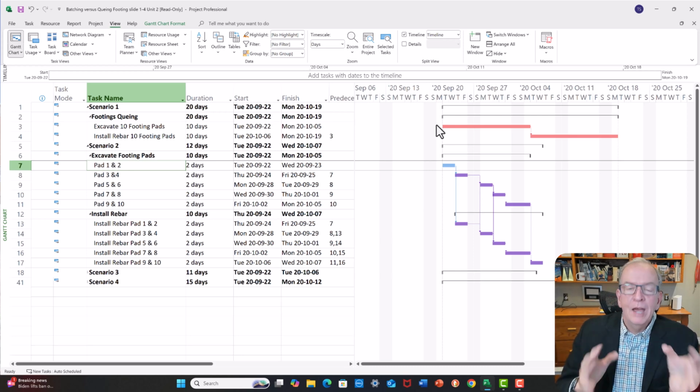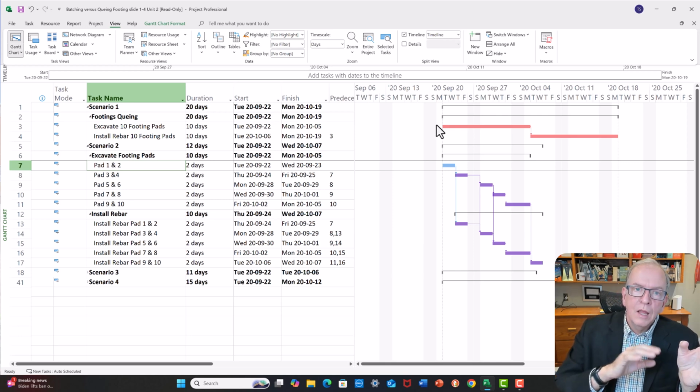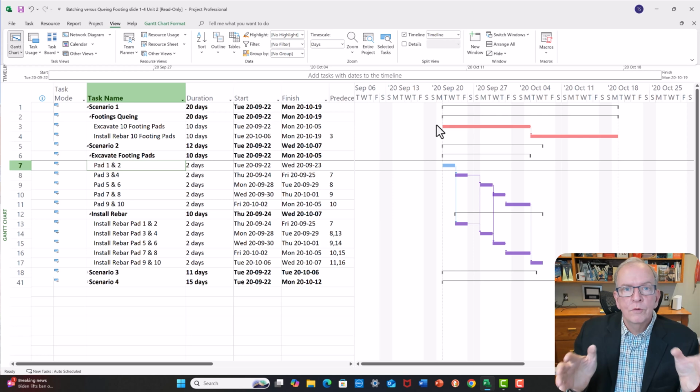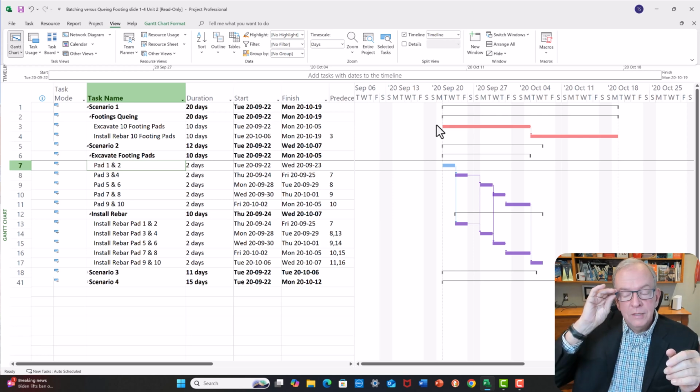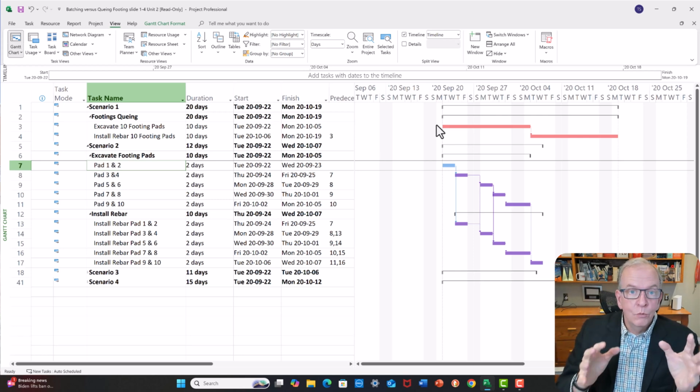But very often I'm telling you that trades will want more space than they actually need. Does this take more coordination? Yes. Is this getting closer to what we call line of balance scheduling? Is this getting closer to what we call tact planning? Yes. Is this shortening your overall duration? Yes. And this can be a very, very effective way to run your schedules and to think about things.